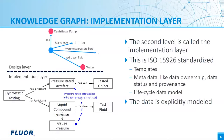There is provenance to know who created the data and what were the former values. There is a life cycle data model so that FEED data — front-end engineering and design — is separated from engineering data, supplier data, and as-built data. The life cycle part is very important: it shows how data matures through the phases of the project, where margins are added, what the cases were that the process engineer calculated, what was required, and what was delivered. Most importantly, the structures are explicitly modeled. In our example of the pump hydro test pressure and water as a medium, the hydro test itself is a specific activity involving the pump and the water, which must have a certain pressure. Now that the activity, the pressure, and the water are all objects, it is possible to assign test data, an inspector name, etc.